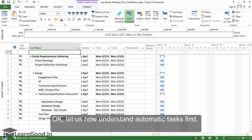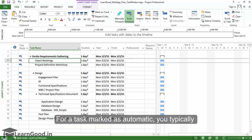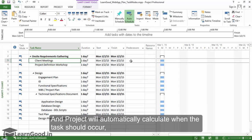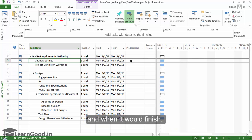Okay let us now understand automatic tasks first. For a task marked as automatic you typically indicate the task name, duration, and the predecessor task, and Project will automatically calculate when the task should occur and when it should finish.